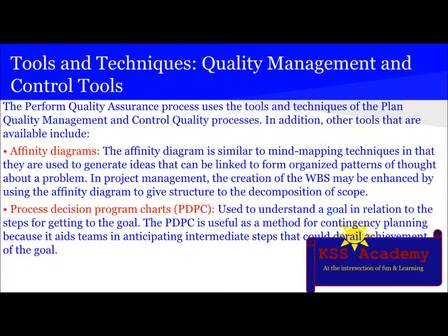The affinity diagram is similar to the mind mapping technique in that they are used to generate ideas that can be linked to form organized patterns of thoughts about a problem. In project management, the creation of the WBS may be enhanced by using the affinity diagram to give structure to the decomposition of the scope.